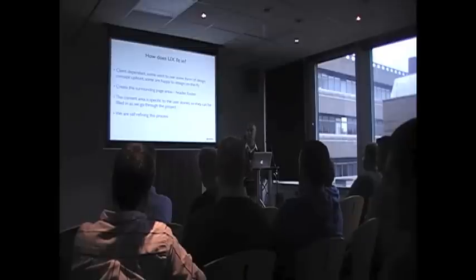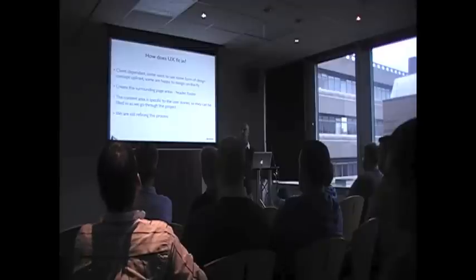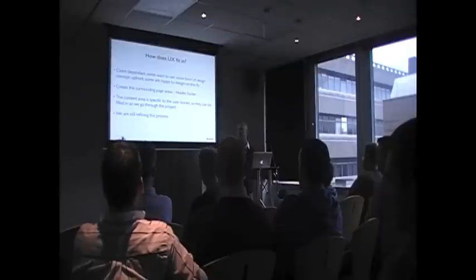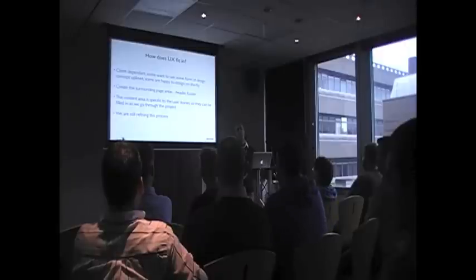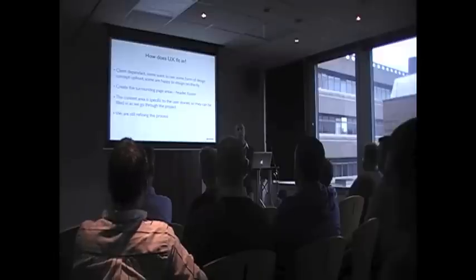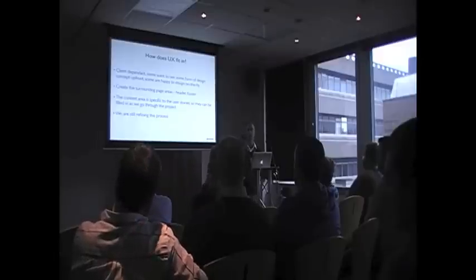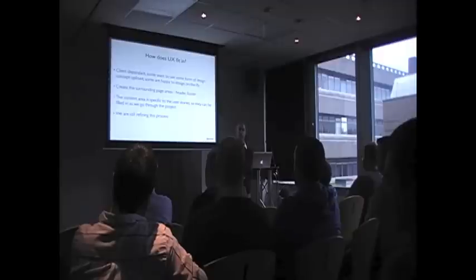It's worked quite well with some clients, giving the initial concept: your website will look something like this, it's going to have these colours and these areas, the logo is going to be here, phone number at the top. But what's actually in this panel, we design as we get to that user story, and we design the sprint before, so we can do the wireframes before, do the design, show those, get them theoretically signed off, with the understanding that when we actually do the development, things may change. That button may not work there because CSS has thrown some bizarre error. So again, it's having that conversation and testing.